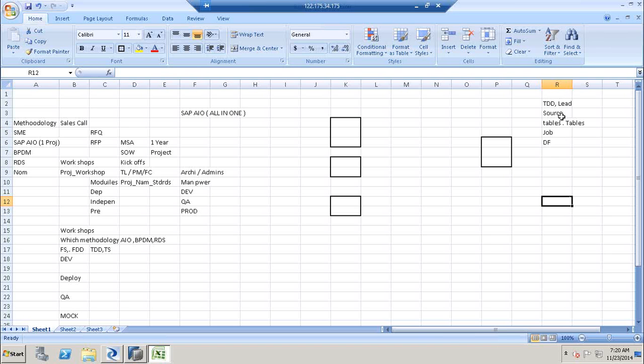And after that, you'll have a code review, where the person doing the code review will look at the logic and the functional design document. If there are any mistakes or wrong understanding, they will correct us to update this, send it back to peer review, and then a code review. And once it is done, it will be signed off or frozen. So this is one important thing: whatever documents you create in this project, be it your FDD (functional design document), technical specification, or SOW, everything should be signed off and converted to a PDF.